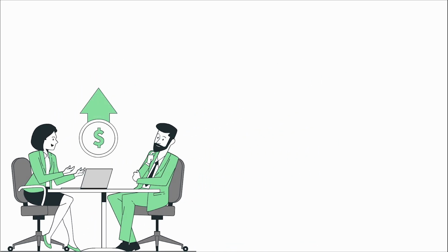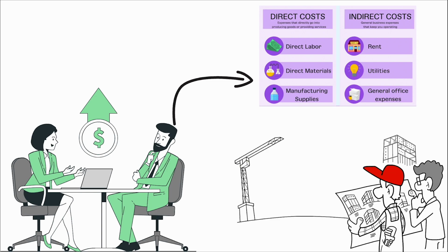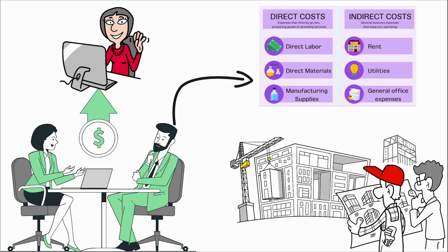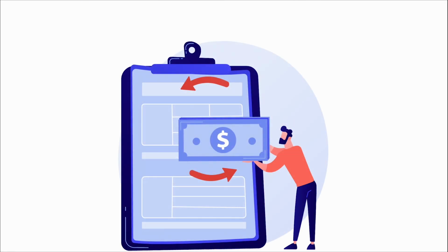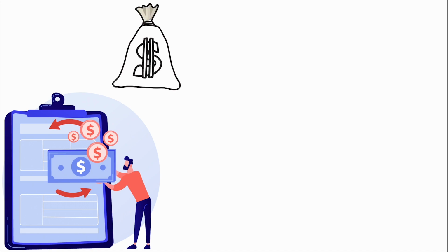It is the backbone of ensuring that the project's financial health is maintained while recognizing that these costs, although not tied to a specific project, are still necessary for the seamless execution of all organizational projects. In practice, a project manager must account for indirect costs in their budget, even though they do not vary with the particular project's life cycle. They are part of the fixed costs of operating a business and thus should be allocated across all projects.